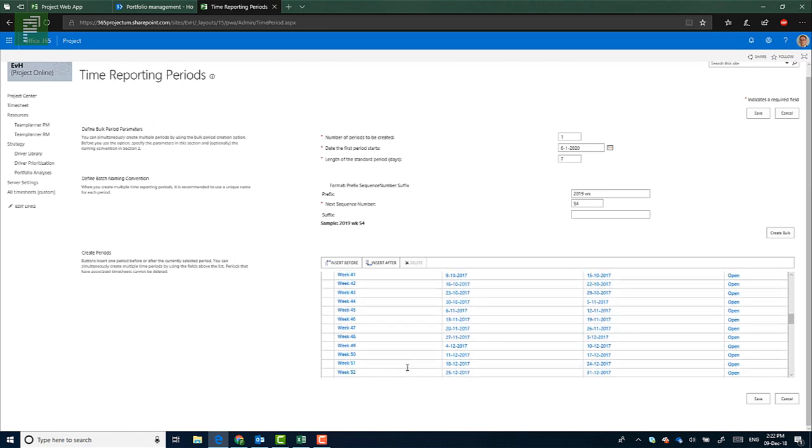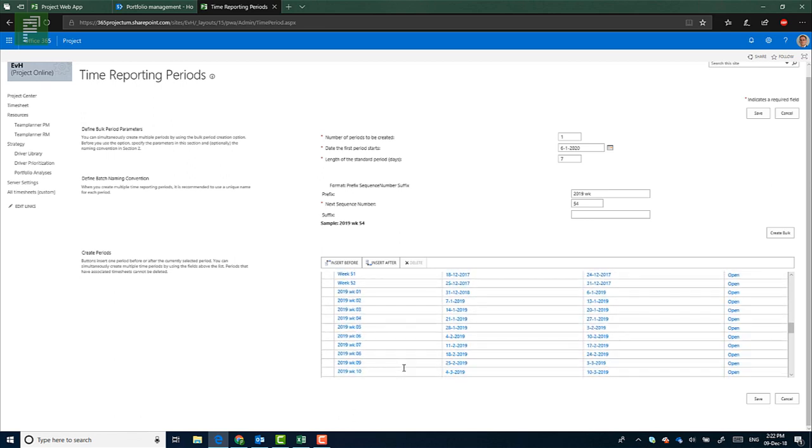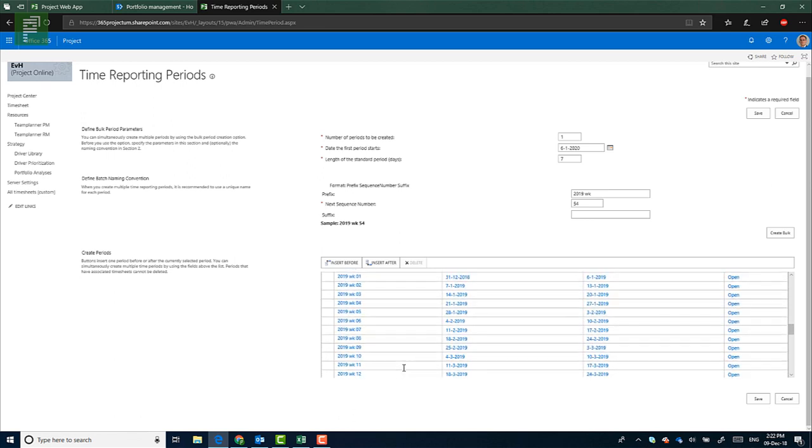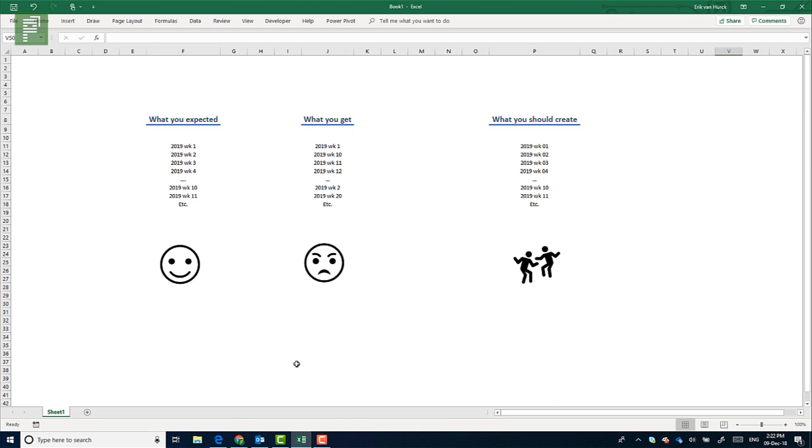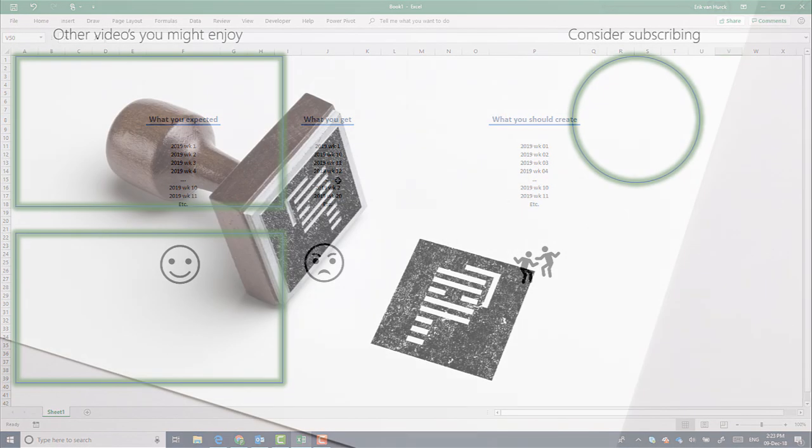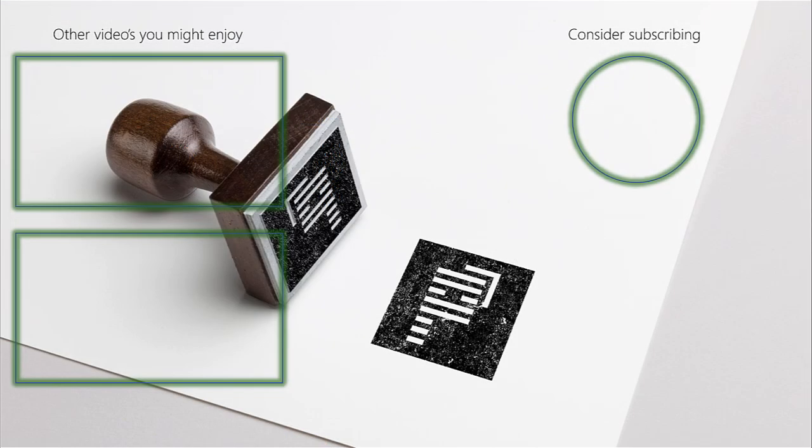And that's the end for the administrative work for 2019, creating new time reporting periods. Now keep in mind, you do want to create a situation where it's easy to report on, where there is a subsequent sorting that you would expect, and not the situation where you have 1, 10, 11, and 2, 20, 21, 3, 30, 31. And that's it for creating time reporting periods.